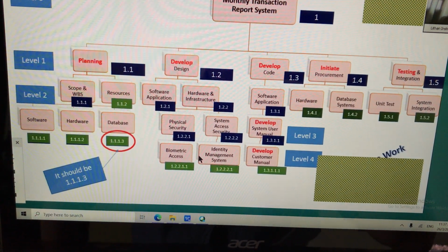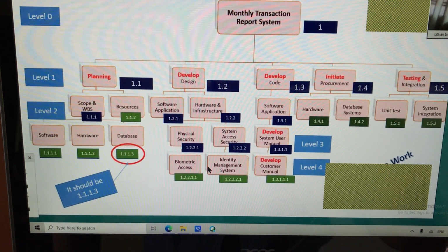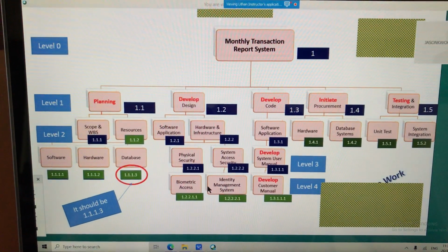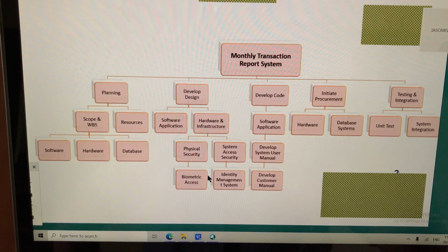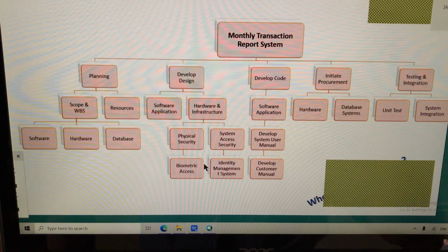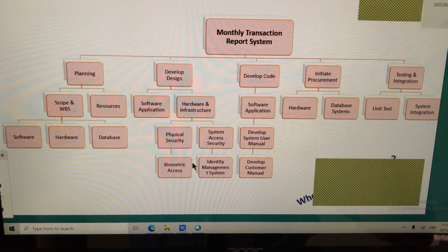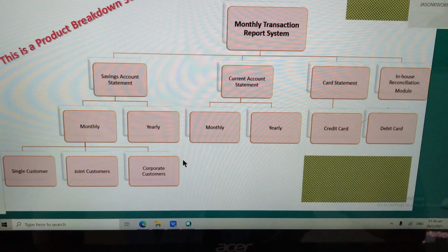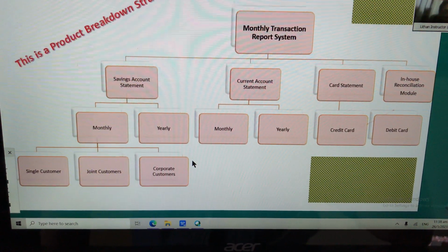All that the project manager will do is run a report from the project performance database and roll it up to the sponsor. If you do a deliverable type of WBS, the status report is much easier to see because it's based on deliverables. Whereas if you do it on process, it's very hard. You need a separate reporting mechanism. Each one has its advantages.